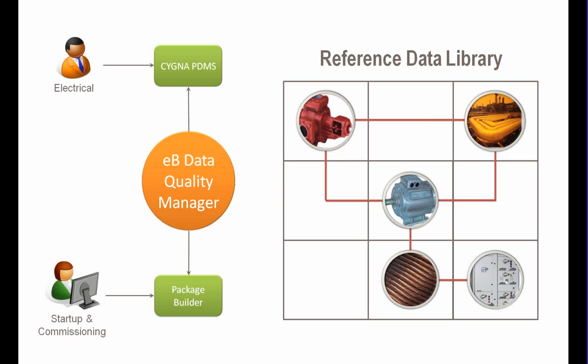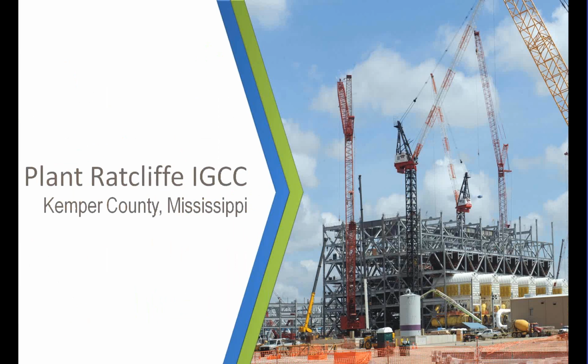In our environment, we use those system code assignments in the Cigna PDMS tool for communication to construction about circuit pulling and circuit termination as they relate to a startup system. So again, we're adding to the pool of data and controlling the way that information is passed through organizations, which, if you go back to one of the very first slides, was one of the problems that we had. There was absolutely no control over the way that the data was exchanged between organizations, and we use this tool to do that. And now I'm going to talk about why